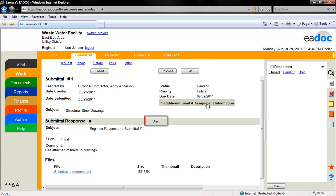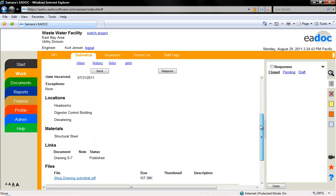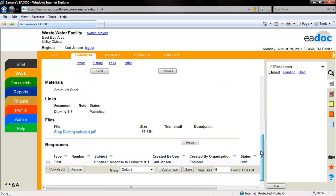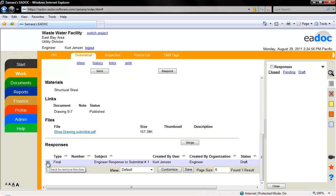As long as your response is in draft form, it can be edited or deleted. To delete a response, click the blue request button to go back to the submittal. Scroll down to the bottom of the document to see the list of responses. Check the box to the left of the response and then click the remove button. A response is not recoverable. To return to the response, click anywhere in the responses line.